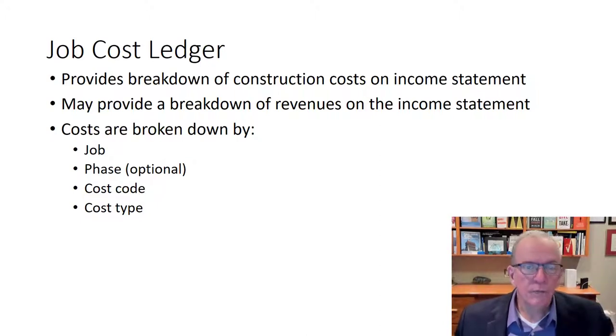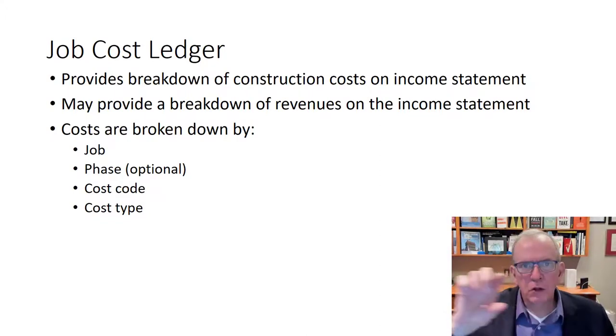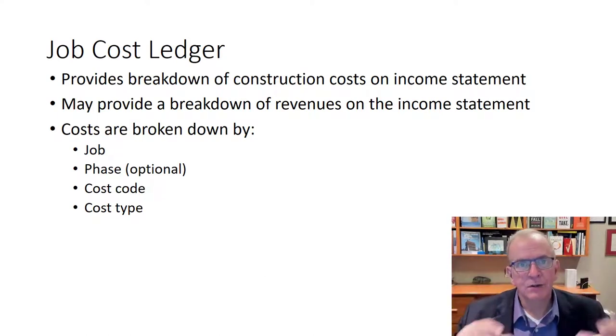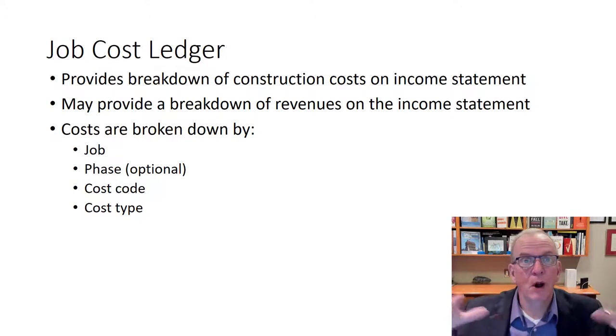But individually, each project has its own kind of income statement, because you've priced and estimated this project, and in the estimate you would have included all the direct costs. You would have allocated a certain amount for overhead, assuming you're going to make a certain amount of sales in that year. That overhead pays for other expenses, like estimating projects that you never get. There are a lot of projects you never get. Think of the estimating team that has to price those projects and pursue them, and you don't get them. Well, somebody has to pay for them. It's the other projects that pay for them.